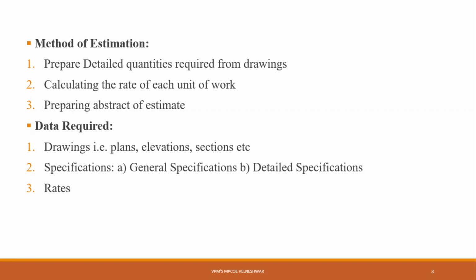Then for those calculated quantities, you multiply by the rate of that item, and you will get to know the cost required for that item.